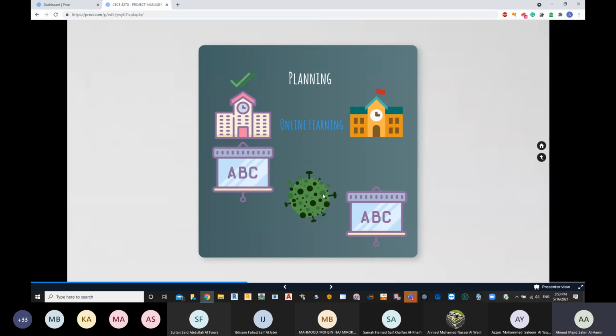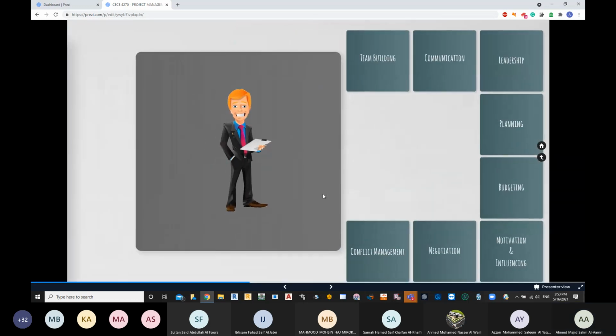So once again, pre-planning is better than post-planning. A lot of you will wonder how you would know that this or that will happen. For example, if I'm a project manager going to construct a villa, the first thing I'm going to do is ask previous people who have done something similar: what problems might occur? This particular thing has happened with us. What was the solution in your case? This is our solution. Did it work? No, it didn't work. So what did you do then? You need to do your homework before you start your actual project.